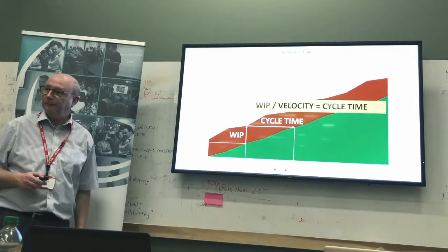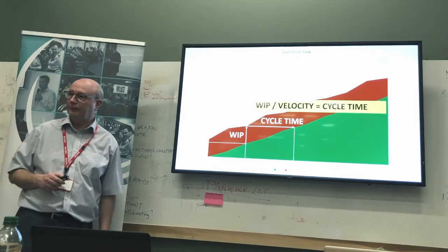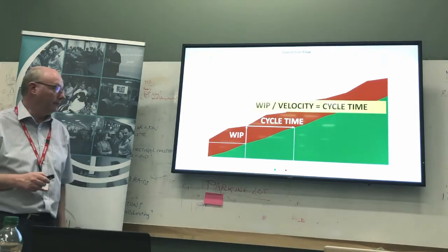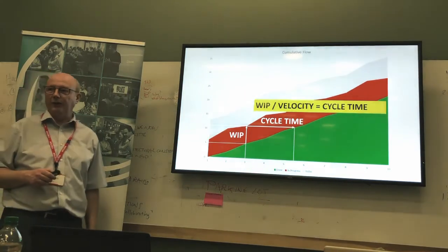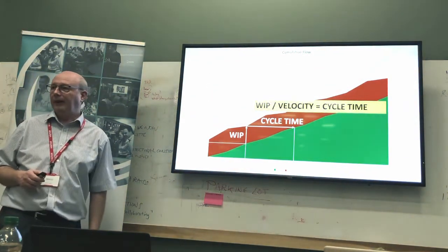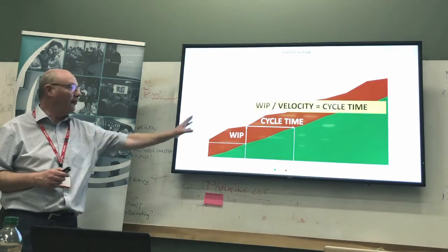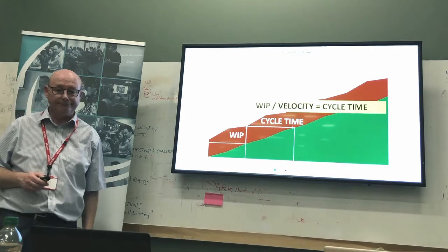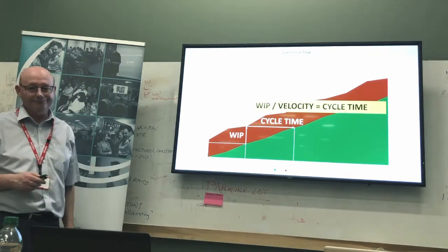The cycle time there, John, that's the average cycle time, isn't it, as well? Because you don't necessarily know it's the same story. No, you don't. If all your stories were the same size and you processed them one after another, then it pretty much would be a true cycle time. But yes, this is an average cycle time, that's right. Okay, so that's the bit with the calculations.